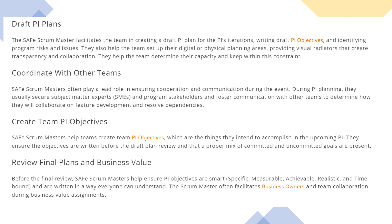The next area is creating the team PI objectives. The SAFe Scrum Master helps the team create team PI objectives, which are things they intend to accomplish in the upcoming PI. They ensure that objectives are written before the draft plan review and that a proper mix of committed and uncommitted goals are present. You can use models like MoSCoW and Kano to identify the right mix of stories to be identified as part of team PI objectives.